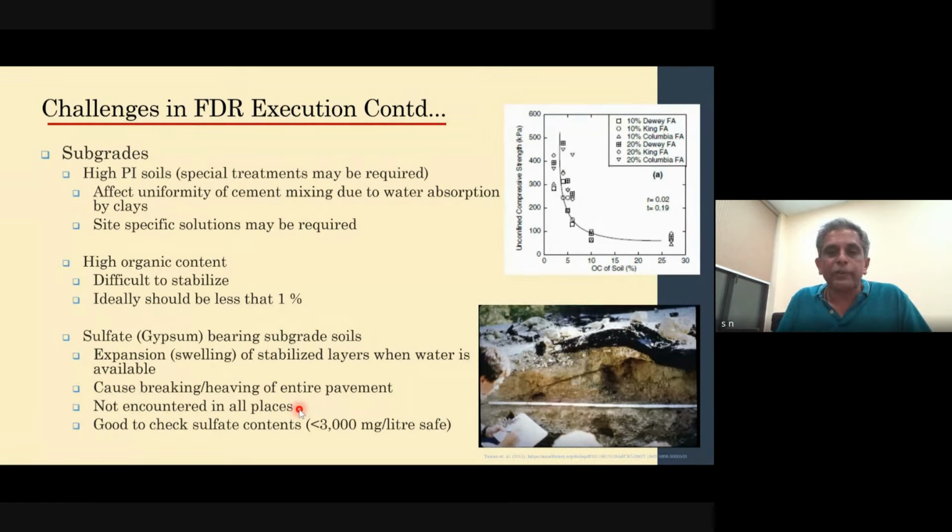Now, last but not least, the challenges on the administrative side. This is related to payments that are made in construction. If you think about this whole process, it is quite expensive in terms of the construction materials being used, and the machinery that you are using is hugely expensive as well. So any delay in making payment can lead to a huge financial loss to the person who is working, the contractor basically.